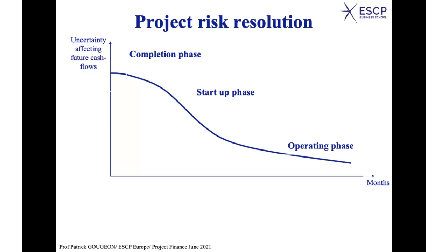And at the end of startup phase, you will have a full understanding of how your equipment is working and what it can really produce. So when you reach the operating phase, usually a large part of the uncertainty has been resolved and the risk is much lower, okay? So this is important to have in mind.